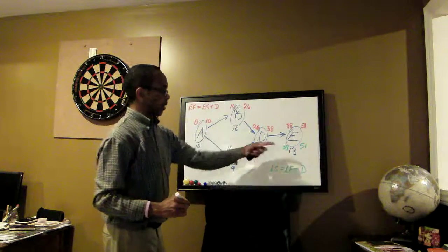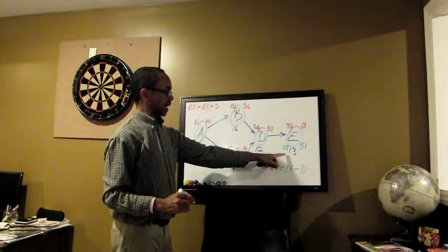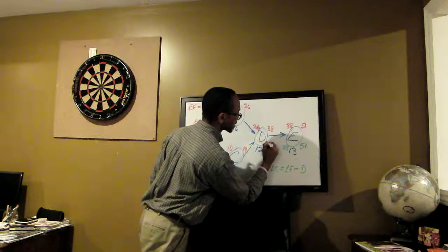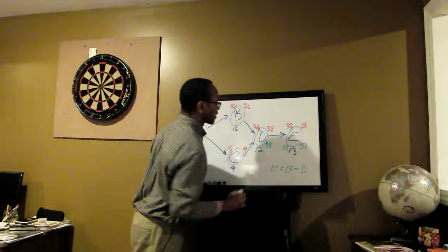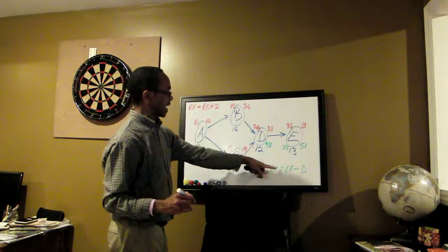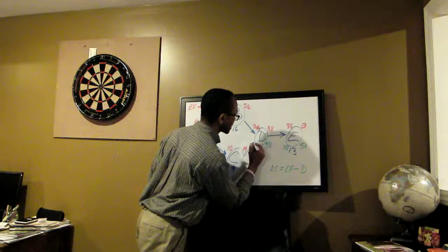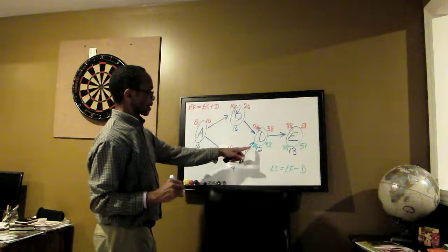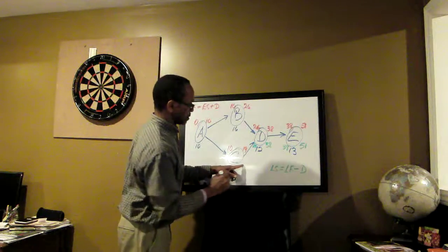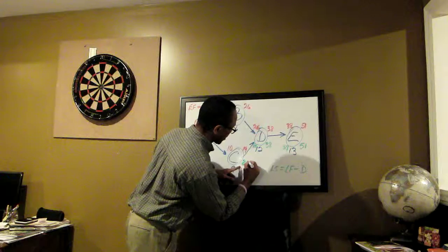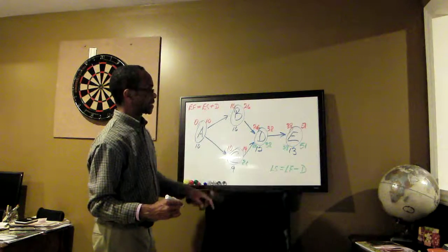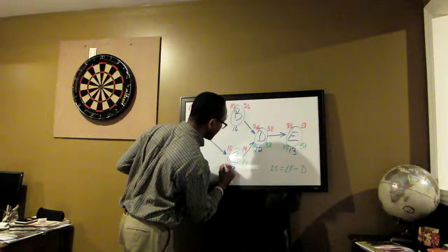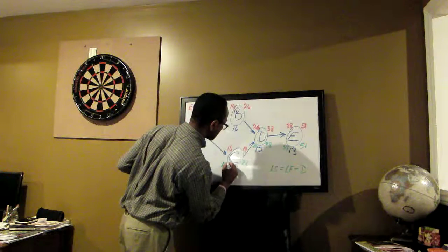Of course, now we're going to take our late start becomes our late finish at D. So that's 38. 38 minus 12, applying that formula, gives us 26. We carry that 26 over here. Our late start becomes our late finish at C. 26 minus 9 is 17.